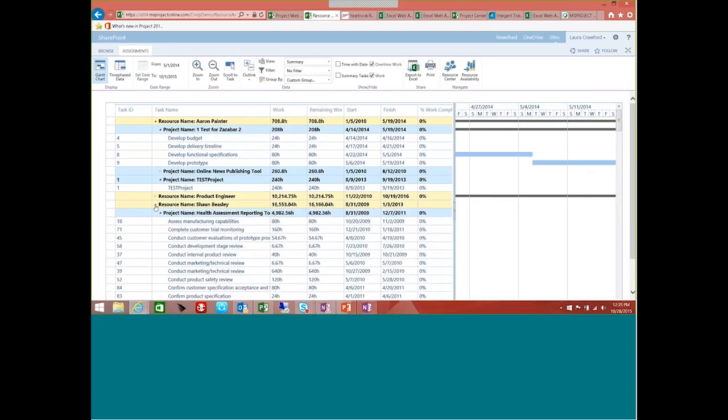The idea, again, is that this is not just my project. This is all the projects that Sean is currently assigned to. It's going to tell me when they're scheduled to start, when they're finished, and the percent complete. This is a great view to see how your resources are currently assigned to tasks in other projects, very helpful especially if you're trying to decide between more than one resource that has the same skill set. Let's see who has the most bench time, and then maybe use that resource. Let's see who's underutilized and use those before we use someone that's already strained to their limits.